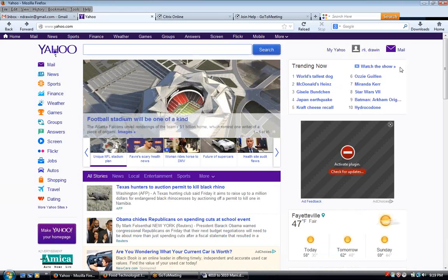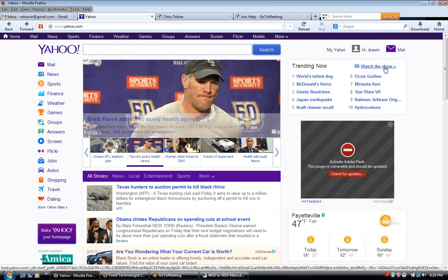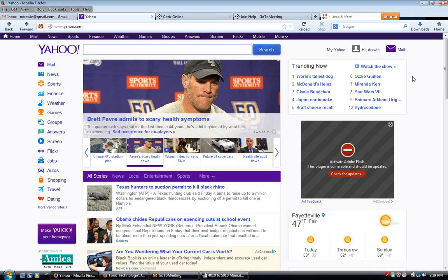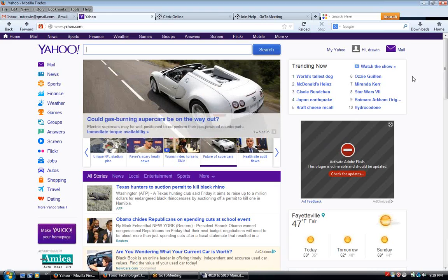So all these four rules are for one click, and that click is one requirement for you, right? Because you said that the right hand side trending now button should display the links of the video. So that is your rule, and that is your requirement. You need to make sure that multiple rules combined together achieve one requirement. That's the difference between the requirement and the rules.